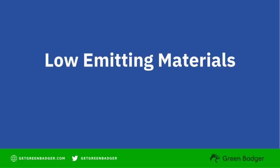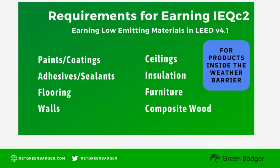The last thing we need to look at is low-emitting materials. LEED reviewers look at products in the building both from a sustainability side of things as well as to see if the product emits harmful gases and chemicals into the building. LEED looks at eight categories of products. If you don't provide products in any of these categories, you don't need to worry about filling in the low-emitting portion of the cover sheet or providing documentation.